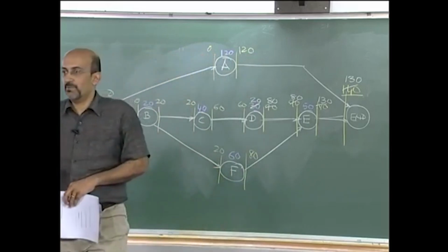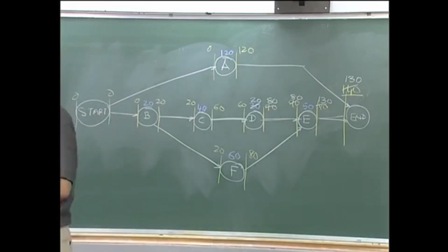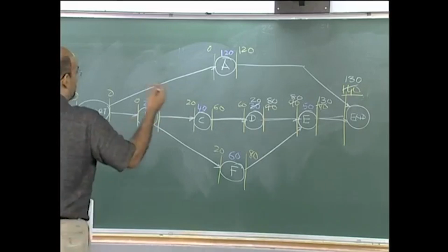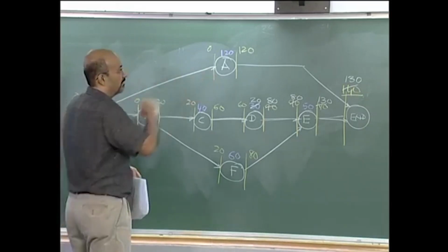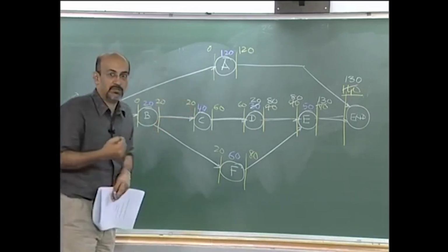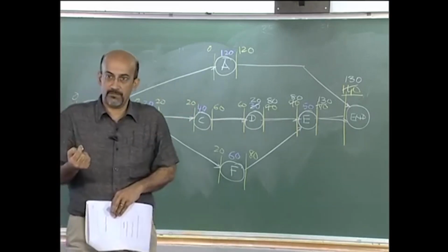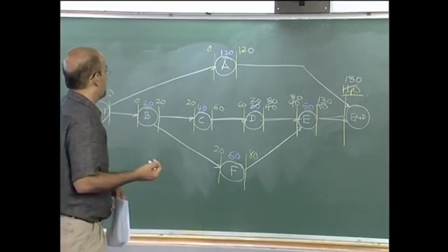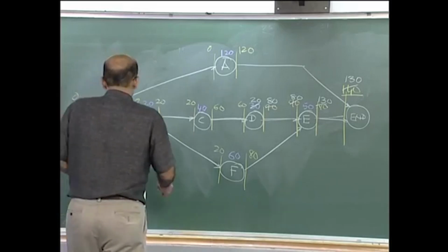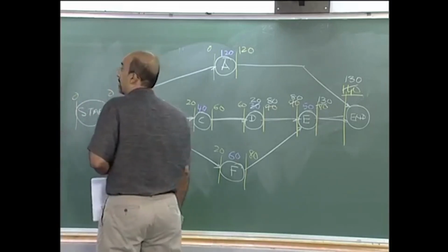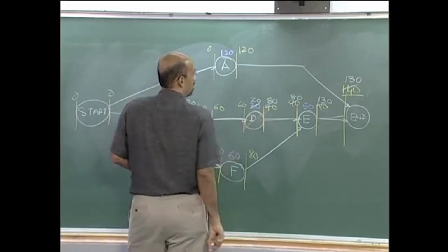You must keep track of the cost. We will show the tabulation of the cost in the end, so I am not going to write it down, but there will be a cost. Obviously D is 60 into 10, 600. So it will be 600, and D is also crashed to the max, so I cannot take D anymore.